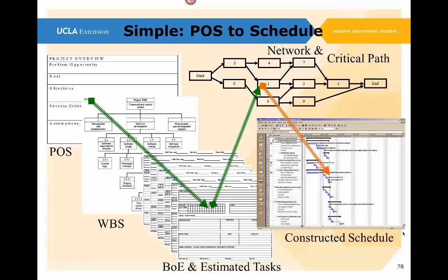And then from that constructed schedule and all that material, we can build up our project cost estimate sheet. During this whole cycle, from the very beginning to this point in the planning, we can be keeping track of any elements that come to attention that we consider to be risks or potential risks, and then we do our risk evaluation.